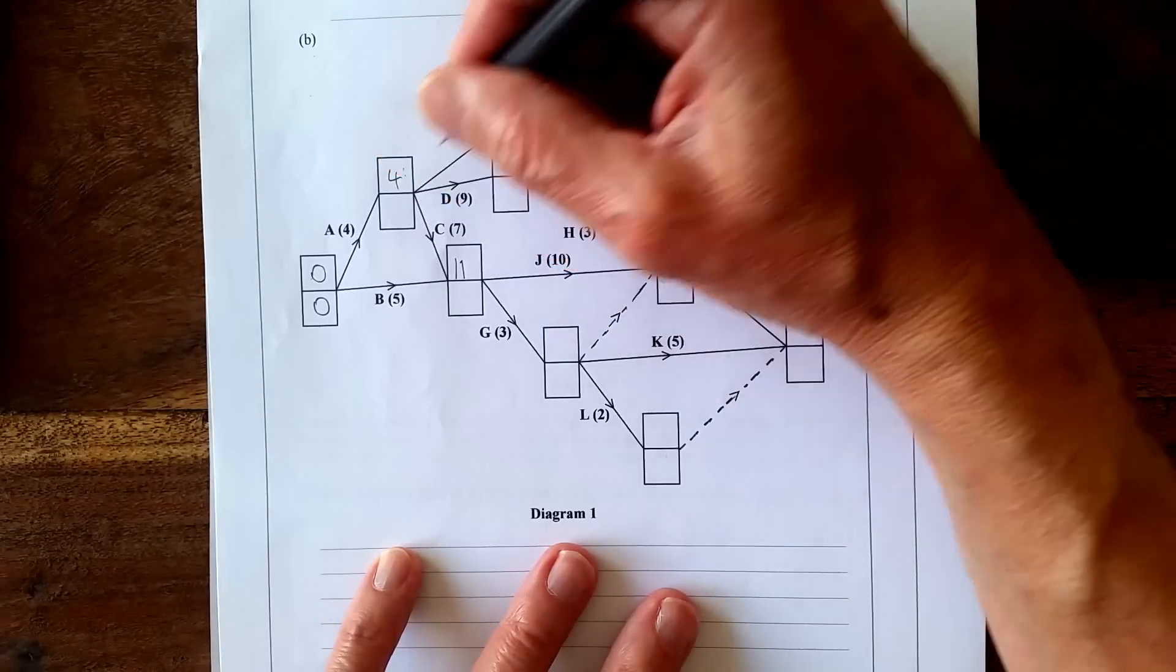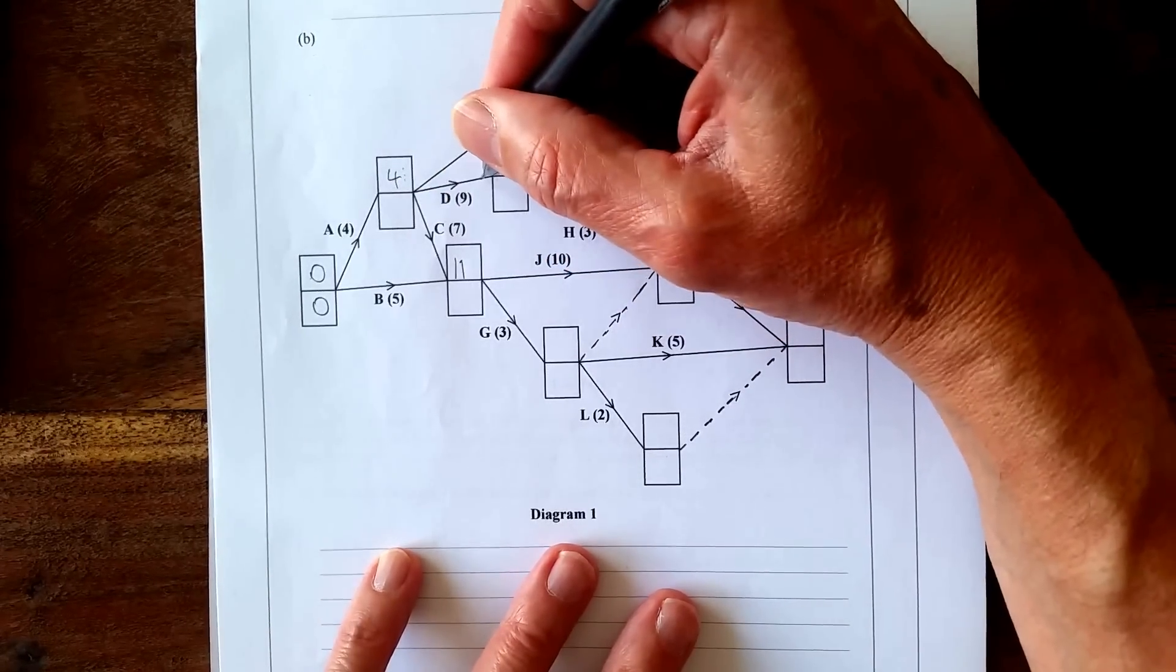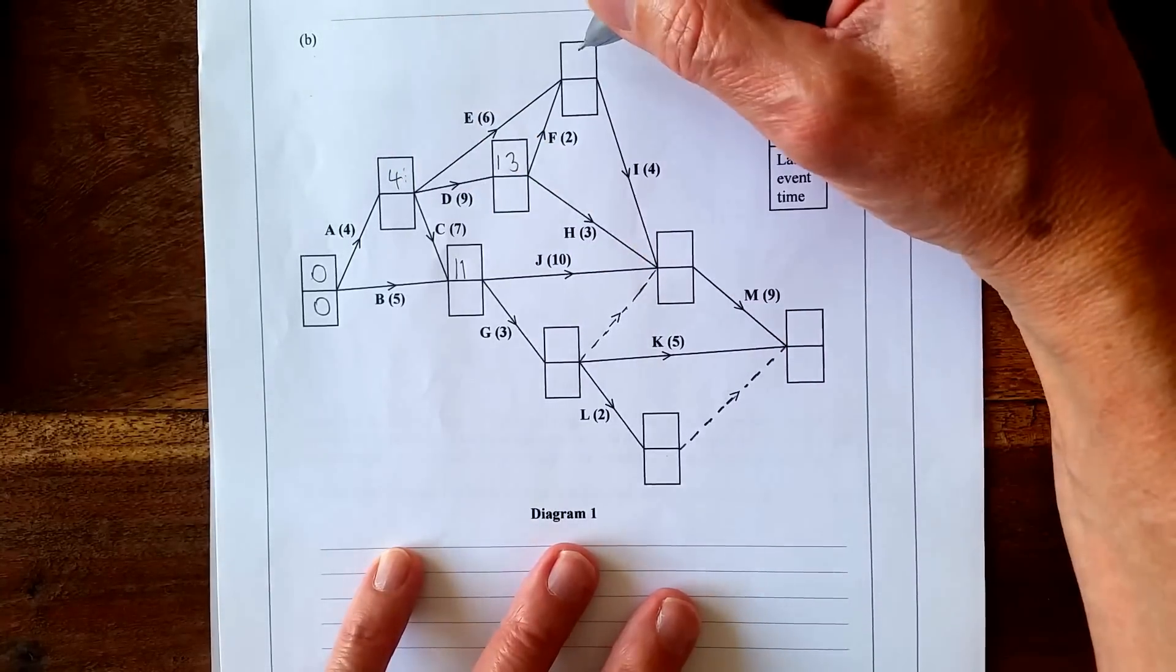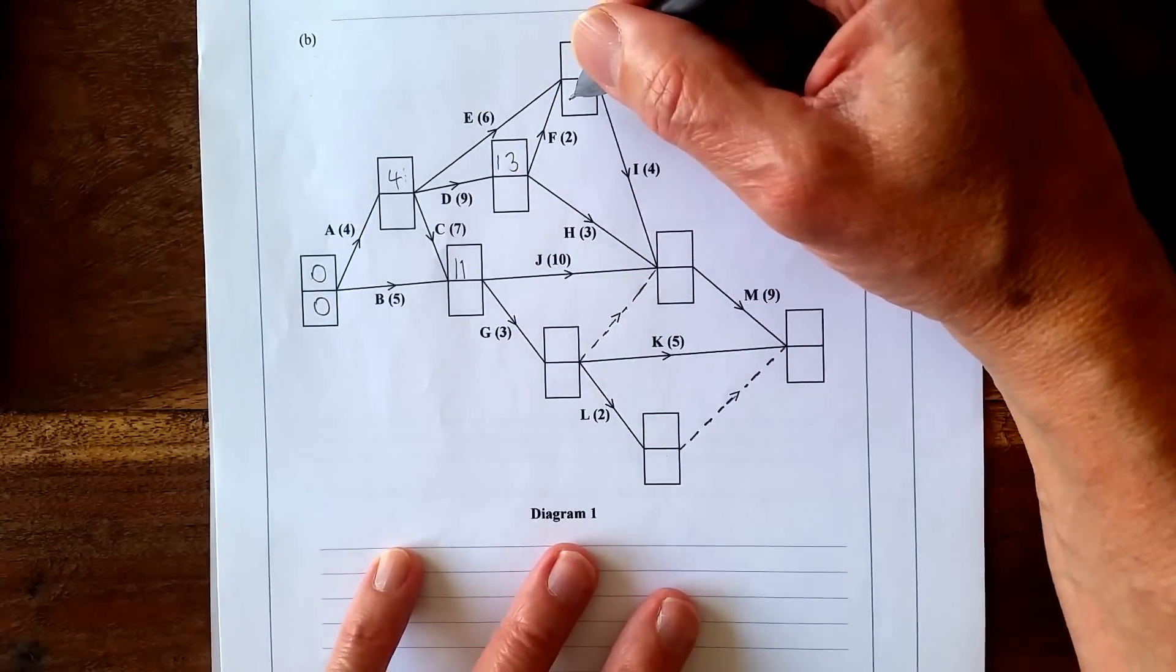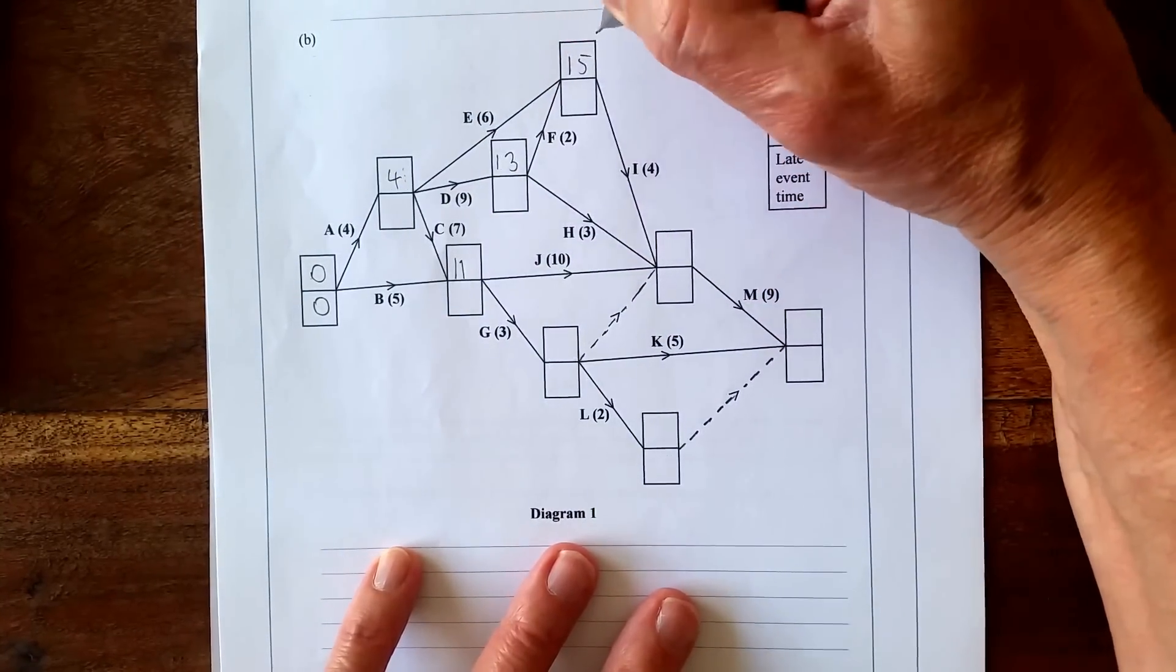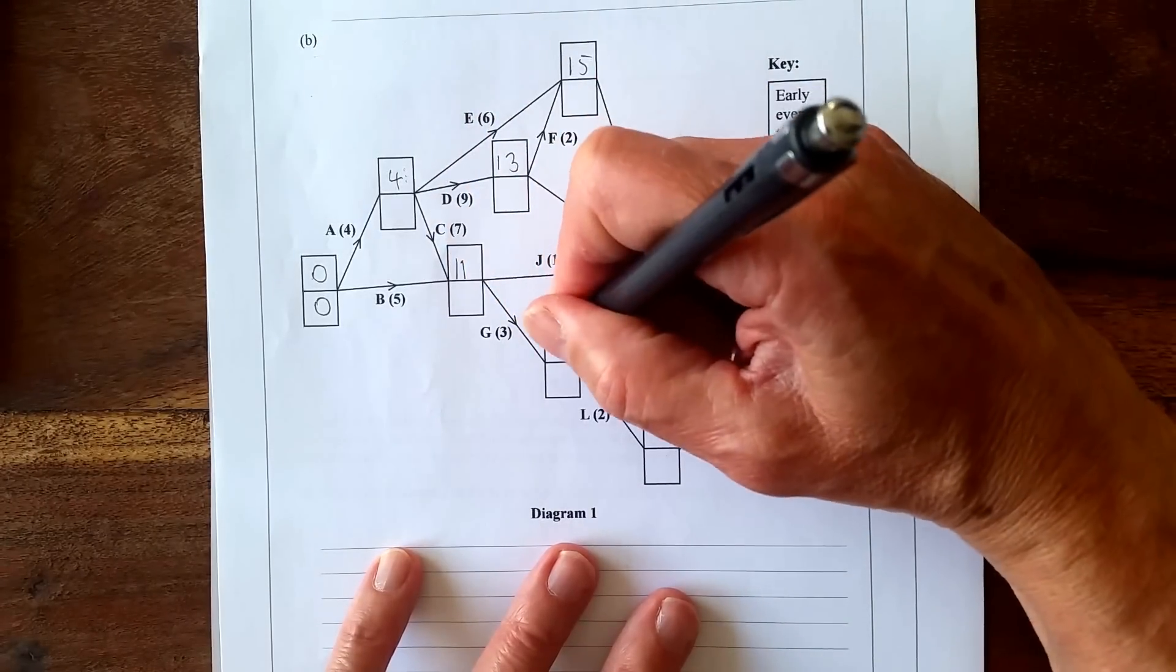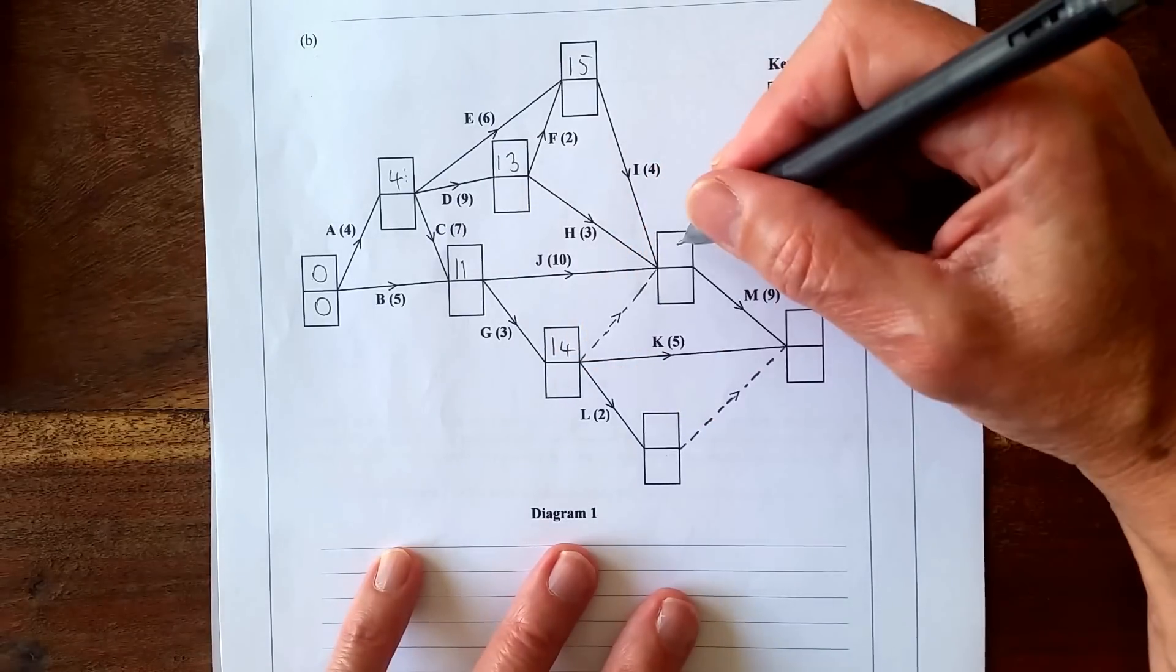And then we've got 4 plus 9 is 13, and we've got 4 plus 6 is 10, and 13 plus 2 is 15, so put 15 there. And this one, 11 plus 3 is 14, and then 14 because this is a dummy, so that's 14 there.